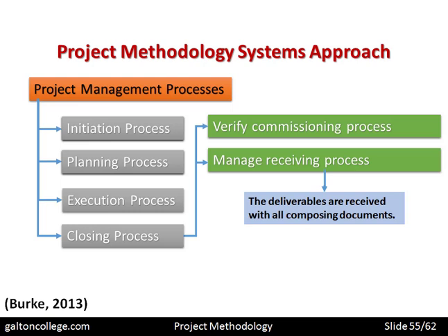So any reservations that the project team have should appear in the documentation. But a good project shouldn't have any of those. It should be clear as to whether the project is adopted or not adopted. So it should not be left to the commissioning department to again face uncertainty and not knowing whether they should take it on or not take it on. There should be a clear recommendation as to adopt or not adopt.